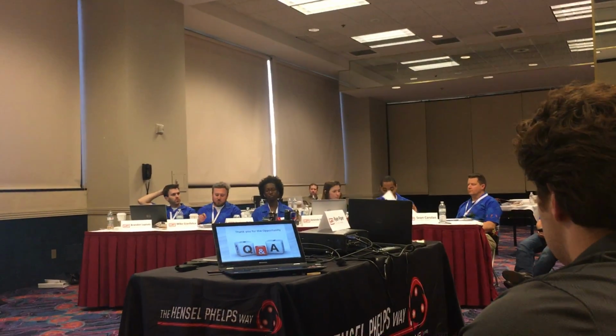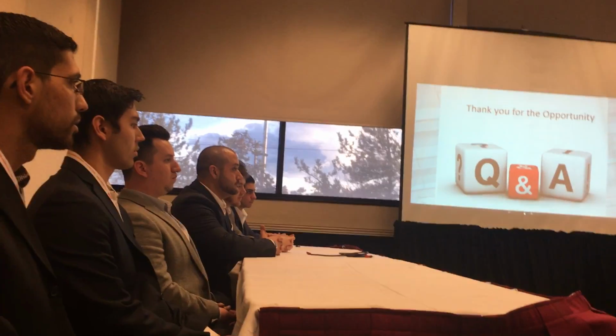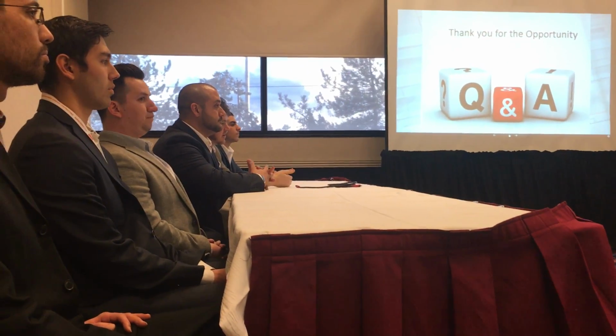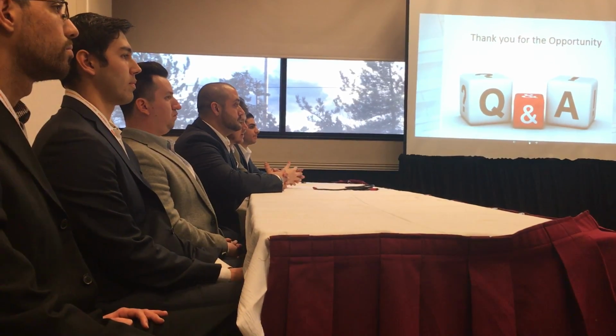All right. One more item. On your punch list setting here, after you do your architect and engineer back check walks, you go through every single floor, which is good. You have a few days for that, but then you have an owner punch walk, which is 10 days, but you don't have any activities after that. Ideally, the architect engineer would have caught most of the things before the owner punch walk. The owner punch walk was mainly to make sure that the owner was fine with the building so we could turn it over to him.